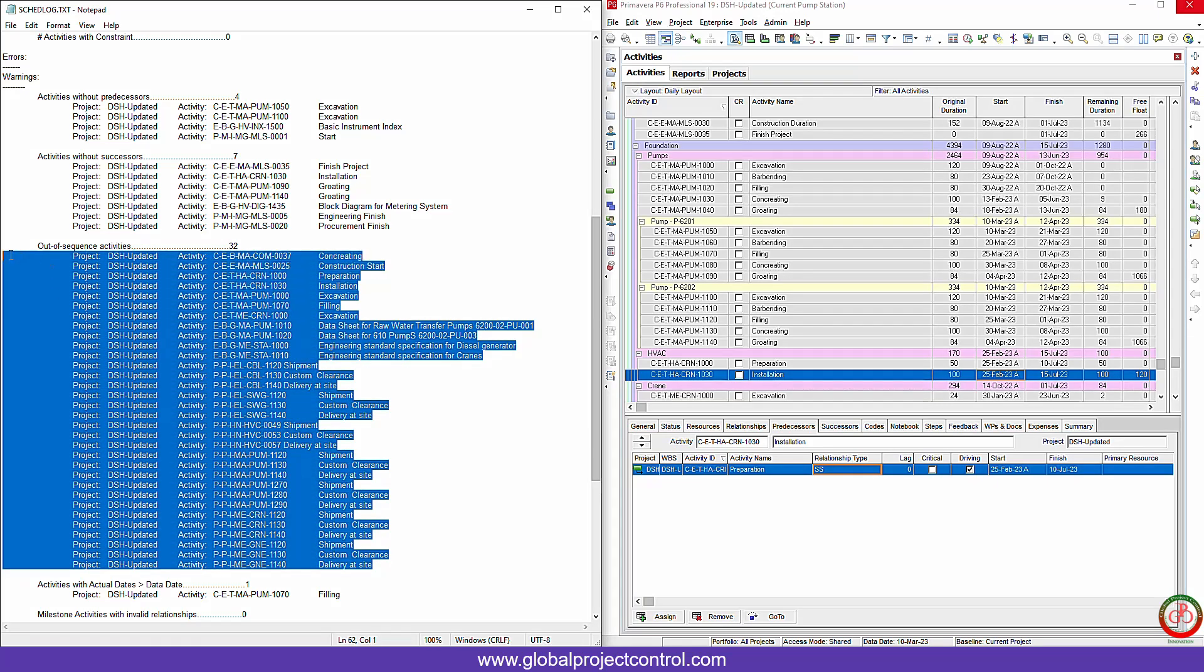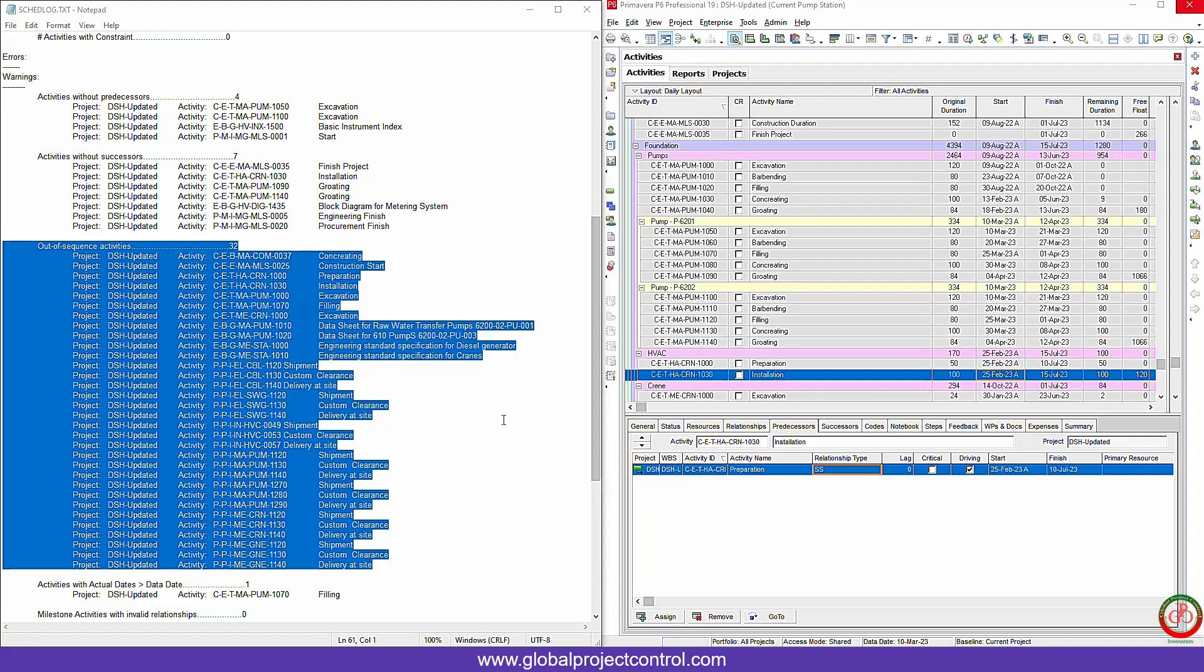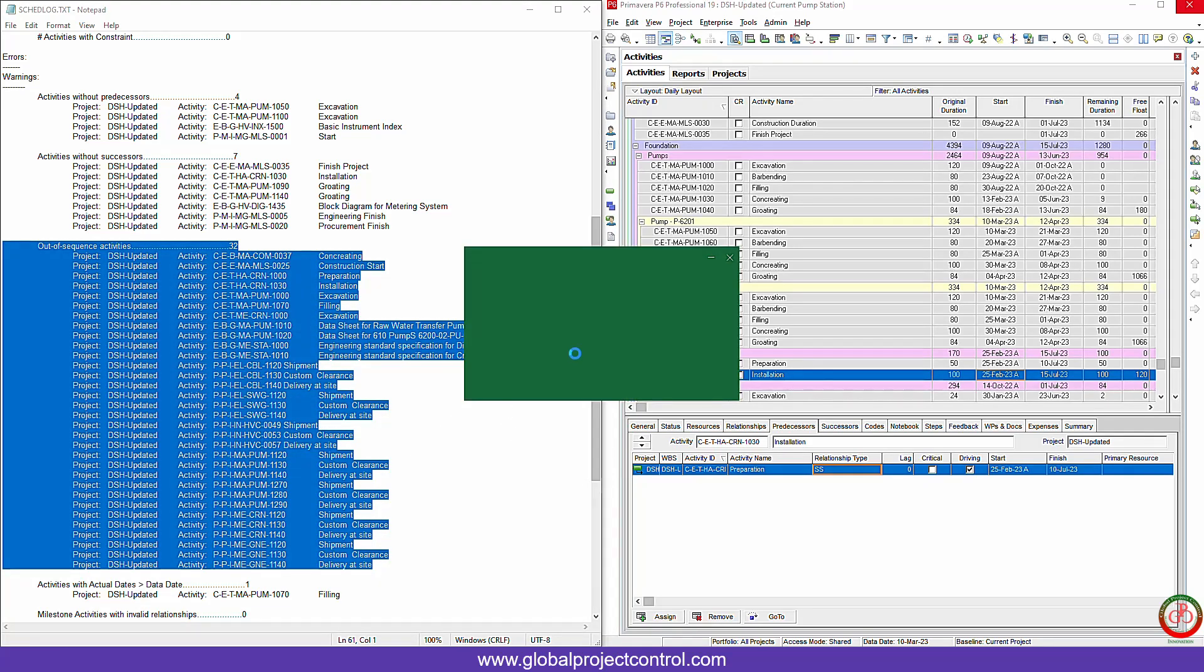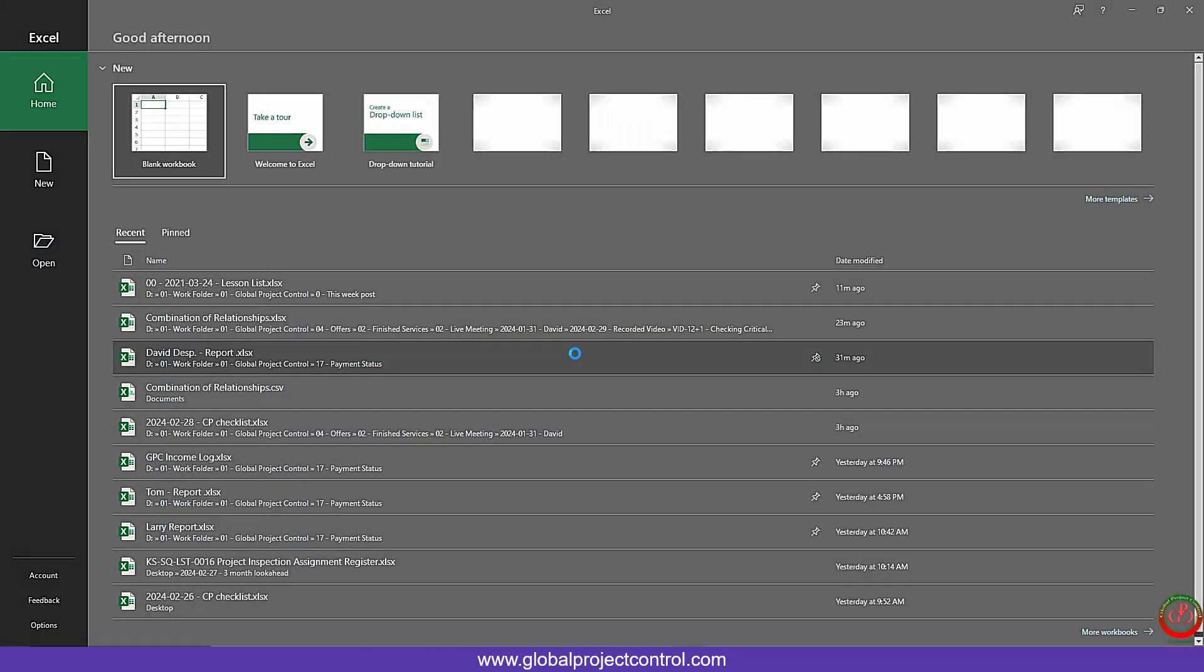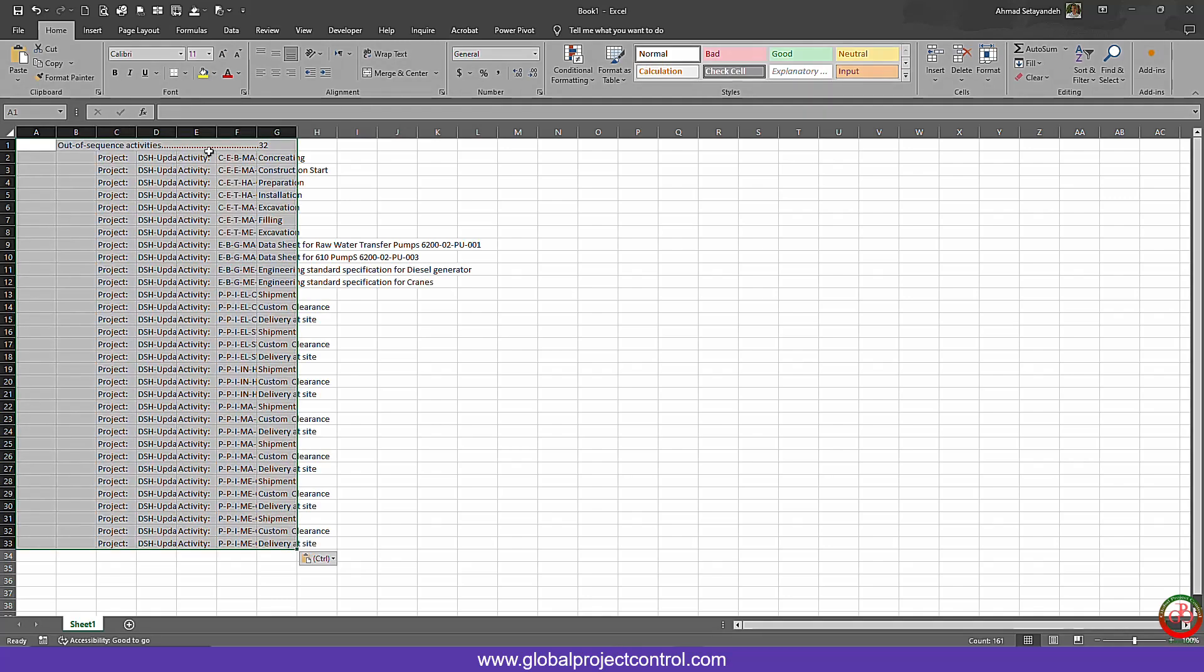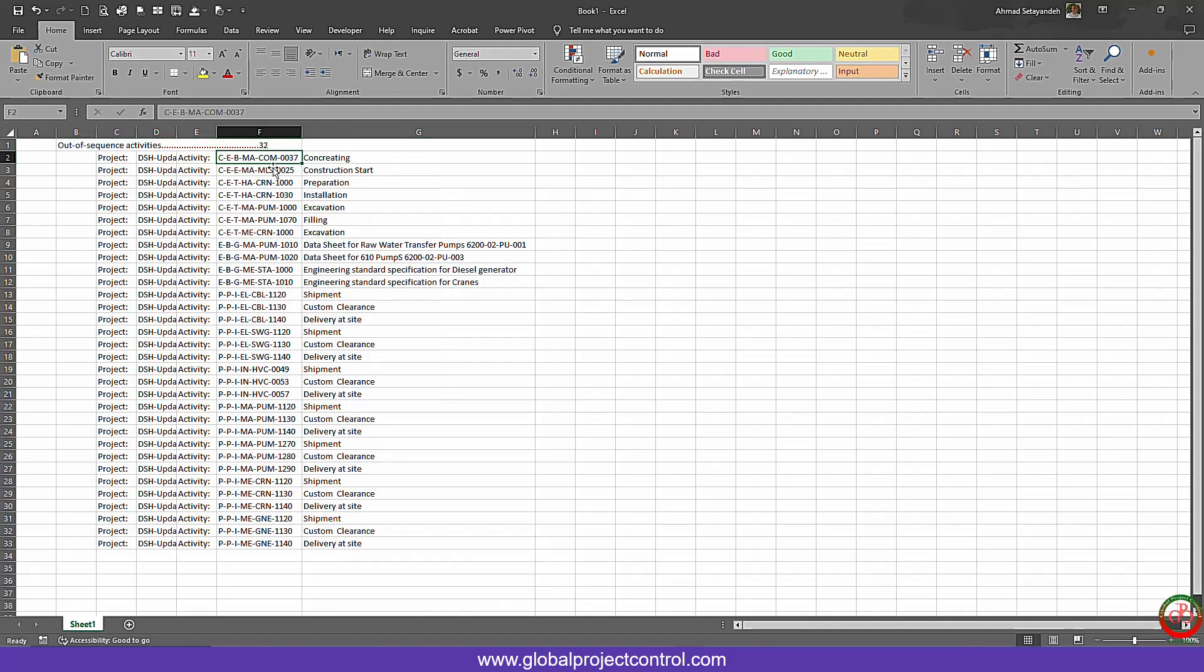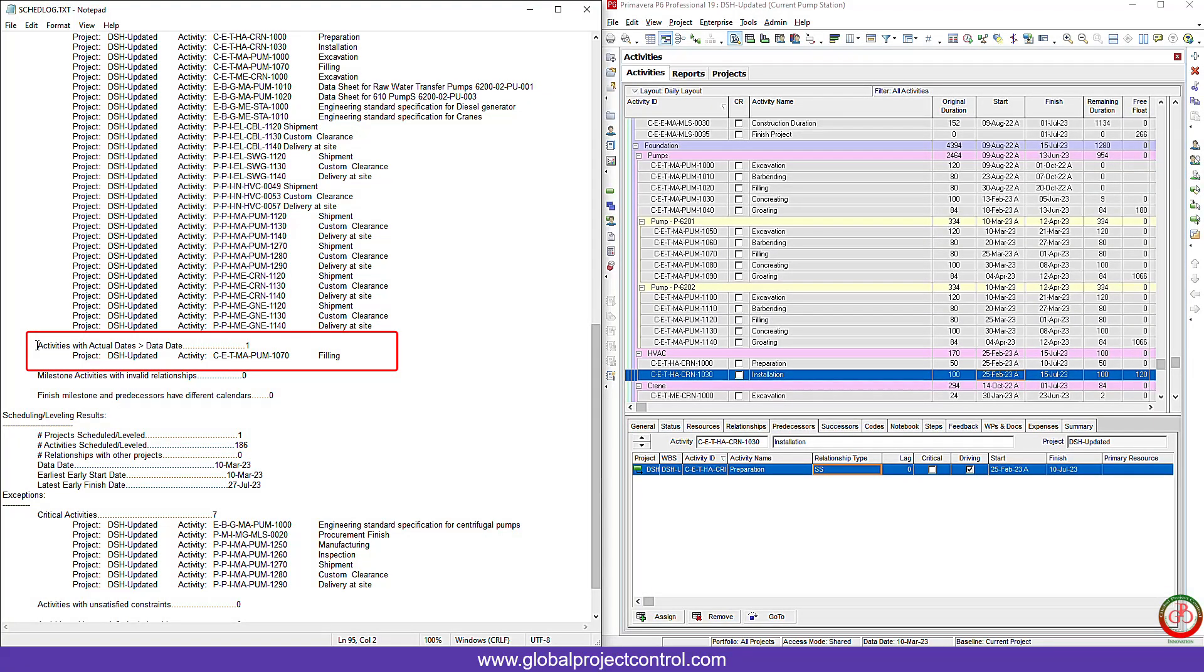For the out of sequence activity, maybe managing of this kind of information over here is a little bit hard. You can easily copy this information and dump it into the excel file like this. Then each one you clear it, you can mark it and go to the next one. If you need to create a change log at the end, you can create the change log and send it to all project stakeholders in order to update them. We update the logic of the project exactly same as this change log.